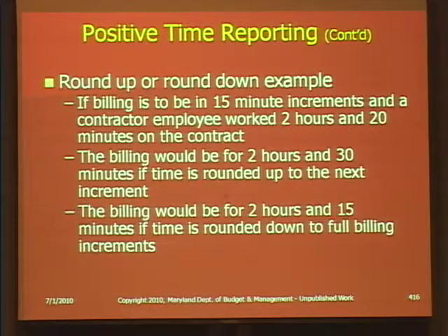If they're billing $100 an hour, 15 minutes is $15. And again, if you have lots of different bills, that could end up to hundreds, if not thousands of dollars just in rounding. And we would rather we save the money than pay it. And if you don't mention it, the vendor's always going to press for rounding up.